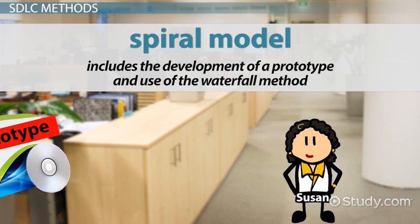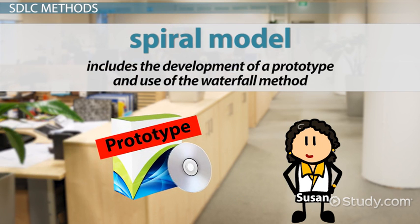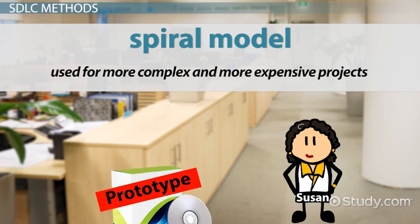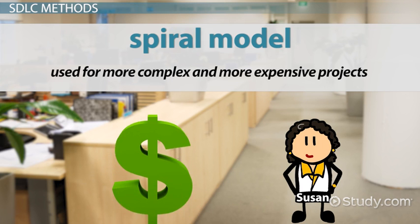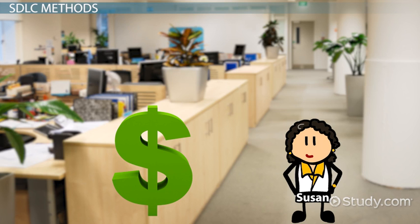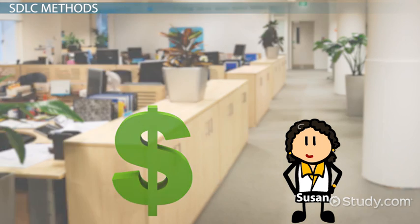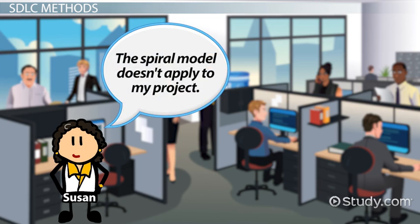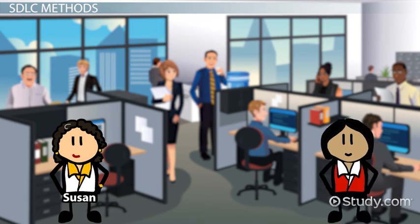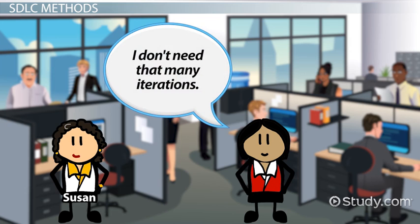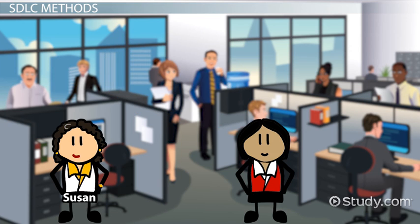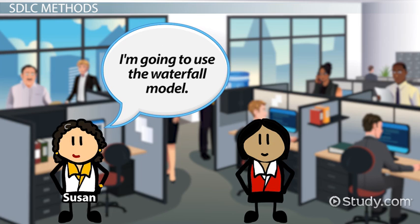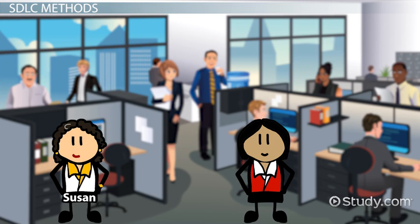The Spiral model includes the development of a prototype and use of the Waterfall method. The Spiral model is used for more complex and more expensive projects, in which a prototype is necessary to begin implementation. Susan decides the Spiral model does not apply to her project because a prototype does not meet her customer's requirements. The Iterative model would provide too many versions of the software, and the customer does not require these iterations. Susan decides to use the Waterfall model, which means that each phase of the SDLC must be completed before the project team works on the next phase.